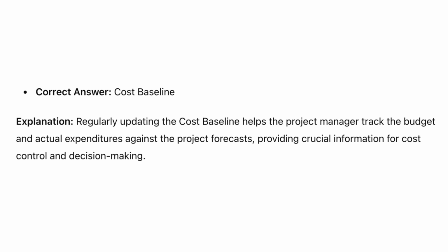Correct answer, cost baseline. Explanation. Regularly updating the cost baseline helps the project manager track the budget and actual expenditures against the project forecast, providing crucial information for cost control and decision making.